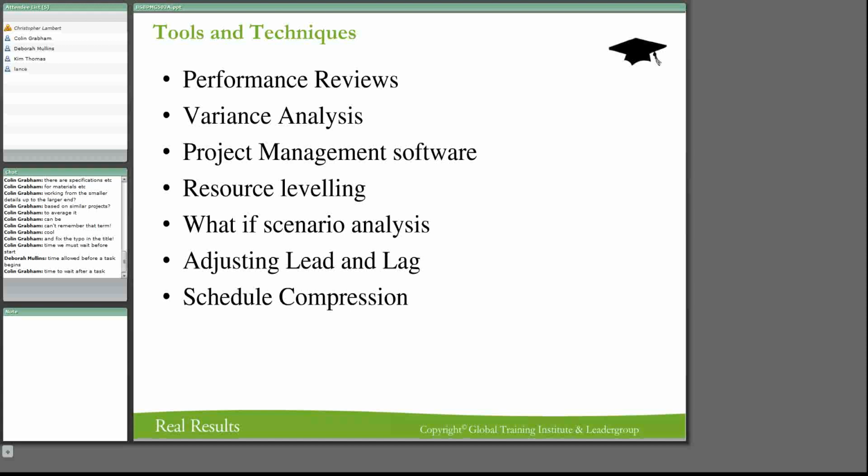In other words, don't put it into the task itself, but add time between the tasks to mitigate some of the risks of having one task on a critical path. All right. So do you understand what I mean by that? Okay. Graham says yes. All right. So what we're actually doing is mitigating the risk of the critical path. All right.